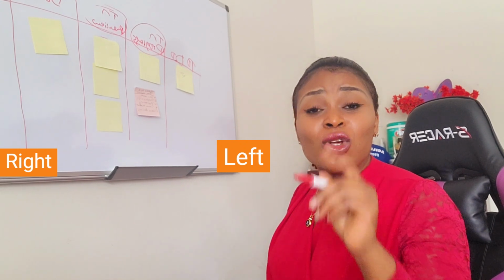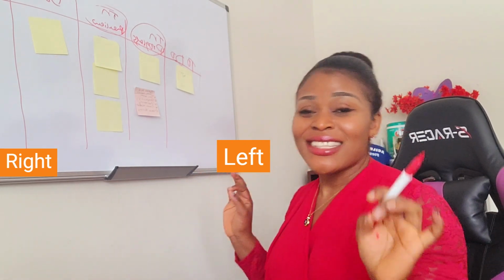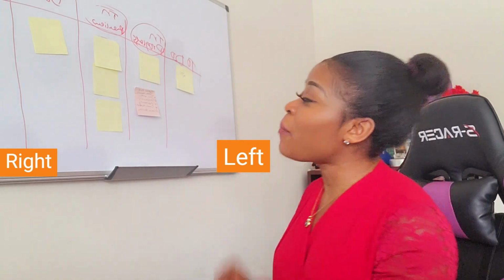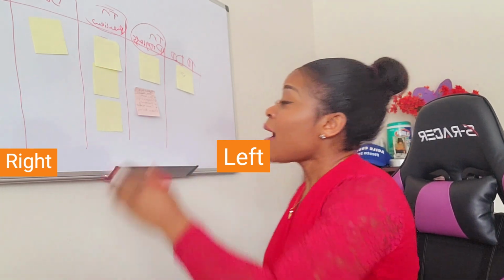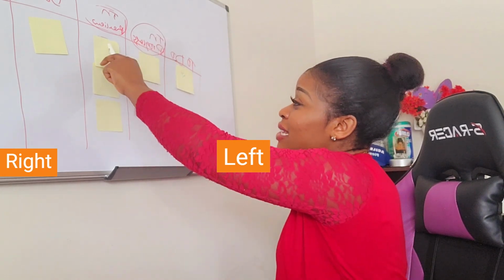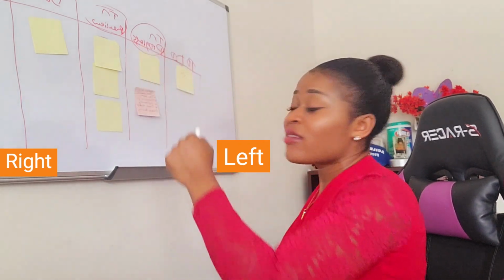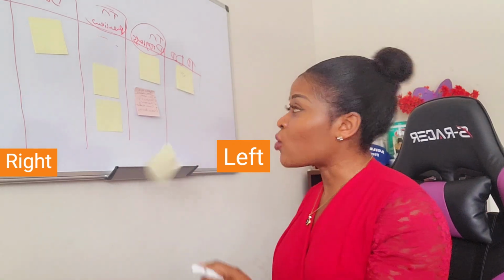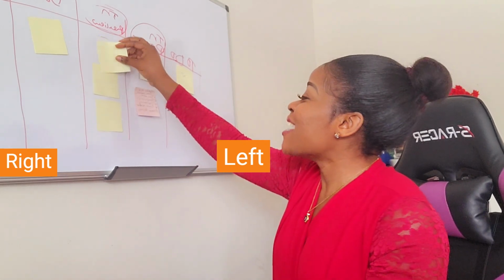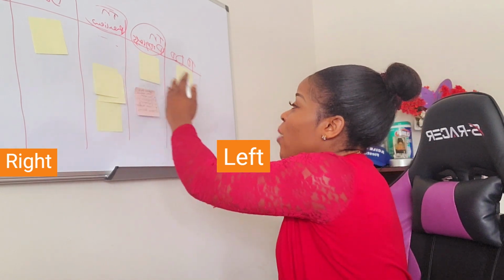That is a problem. So to resolve that issue, whenever we connect for the daily Scrum, I do my little chit-chat, hi everyone, hope you're okay and your day was good, all of the nice stuff, and then I pull up our board. This is Jira. Let's assume that this is Jira. I'm starting all the way from the in review column, and I'm going to start with the ticket that I see there. I would like the team member who is the owner of that ticket, the assignee, to talk to us about the progress of the work, and we will move all the way.